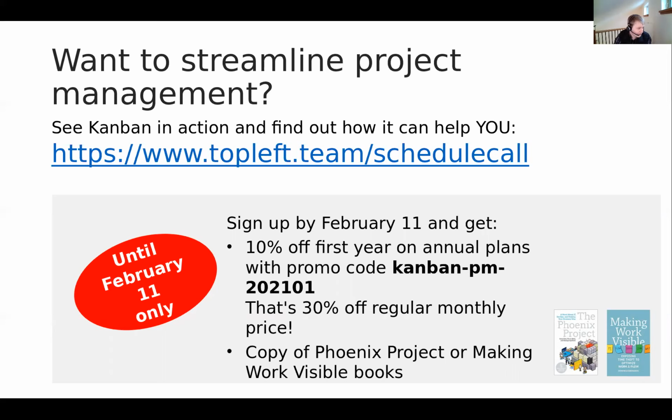There is another question. Is the WIP limit a notification, is that what you had said, or does it limit the tech from scheduling more? Okay, it's a notification in the application. So there's some area that is normally just gray. It counts the number of tickets that are in that column. If you go over that limit, it turns red. So it makes it easy to see. It does not prevent you from going over that.